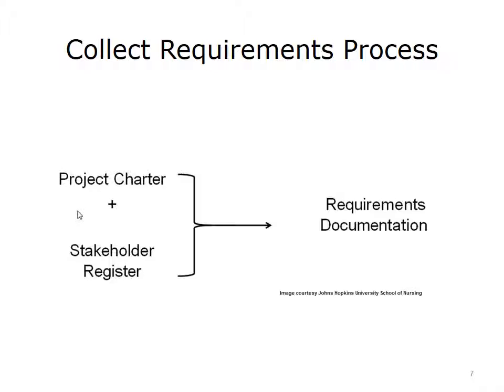To ensure project success, it is very important that the project scope be clearly defined before starting project execution. Project requirements are generated from the information contained in two project initiating documents, the Project Charter and Stakeholder Register. The project charter is issued by the project sponsor, which formally authorizes the existence and start of the project, describes the business need or justification of the project, and provides product and project requirements. The Stakeholder Register contains the requirements or needs of the stakeholders.